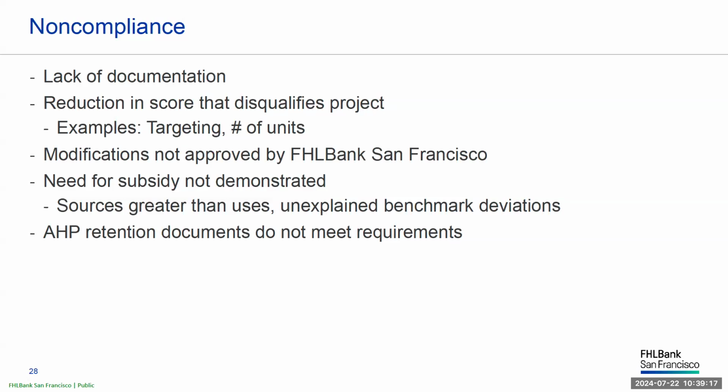If there are any significant changes in the project, it's imperative to communicate these changes with the bank staff as soon as possible and provide a cure plan and good cause explanation so that we can work with you to ensure the project remains eligible for subsidy. Any modification that is not communicated to or approved by the bank prior to initial monitoring may cause the project to be non-compliant.